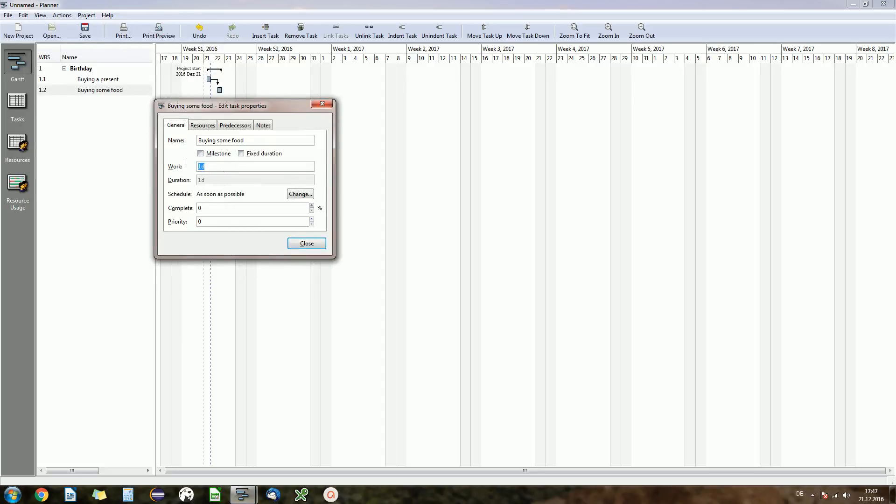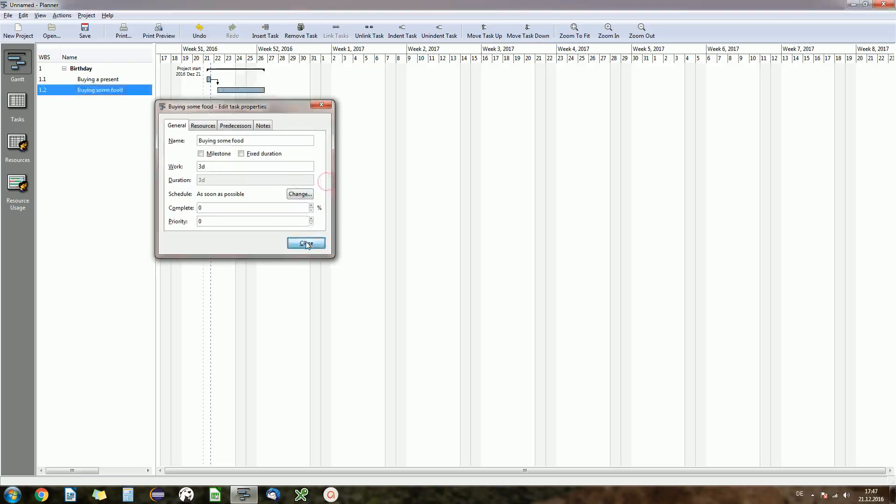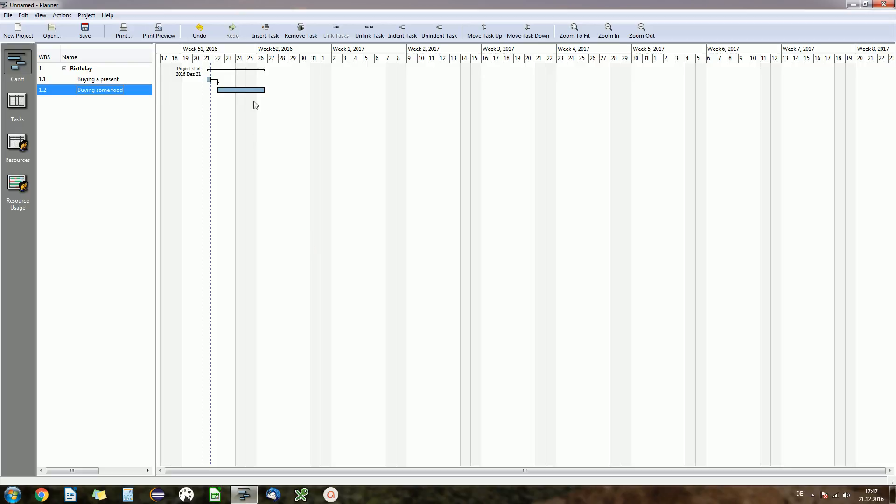Okay, now you can of course adjust the duration or the work of your tasks. Now if we say we buy a lot of food and that's three days of work, close that, and now you see our project starts today and will end on the 26th of December.